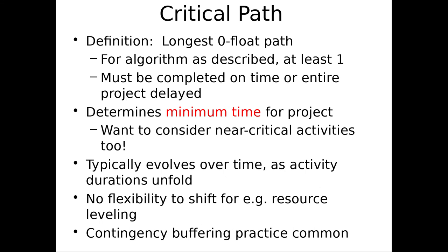The other things, we have flexibility on. We have give on. Yeah, we can start that documentation a bit earlier, a bit later. That's not what's going to be holding us up. We have various ways of describing it, right? That's not what's going to be delaying us. And it's very common in projects to have certain long lead items you got to get done. Maybe it's asking the tech staff to set up a virtual server for you. You're going to be waiting until they do that. You can't start something else, and so that's on the critical path.